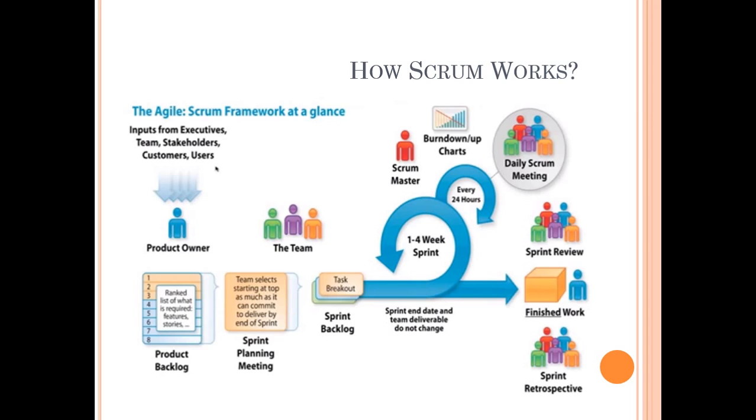The team tries to understand whatever they have built and whether it is up to the mark or not, whatever requirements they have committed at the beginning of the sprint, whether they have achieved or completed these feature developments and satisfied the customer. That's where all is discussed in a sprint review meeting. Usually the sprint review meeting is like 2 hours for a 2-week sprint. Normally the convention is 1 hour a week. So if we have a 2-week iteration or sprint, then the sprint review meeting should not last more than 2 hours.